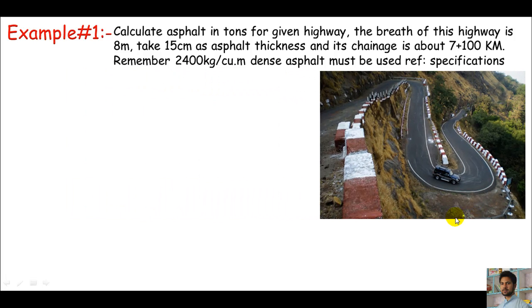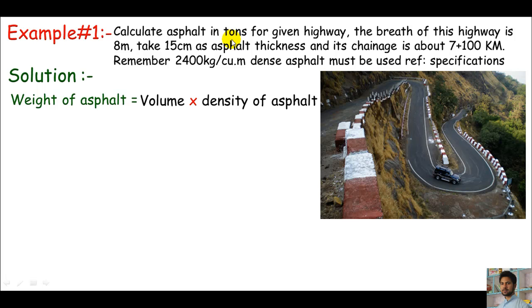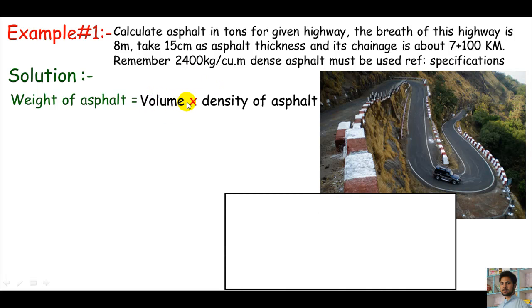I must start the solution for asphalt calculation. I'll come straight into solution and my approach is the weight of asphalt. We are asked to calculate this in tons. The weight of anything is always its volume times density. I'll first calculate the volume because the density is given. The volume is always the cross-section area times length: breadth times thickness times length.